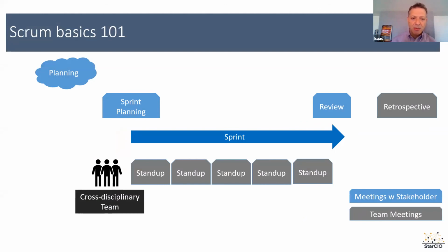But when they hear Agile and they hear Scrum, they're immediately gravitating to the ceremonies that make up an Agile practice. They include coming up with a sprint, which is usually a 1 or 2 week duration. Teams actually planning what parts of their backlog they're going to focus on. They're going to commit to work getting done, which is a highly different dynamic. If you've ever had project managers come in with Gantt charts and saying, this is what the team has to focus on, you're now coming in and saying, here are the priorities. Team, come to me and say to me what you're actually going to get done over that sprint period. That team commits, they go into a sprint.